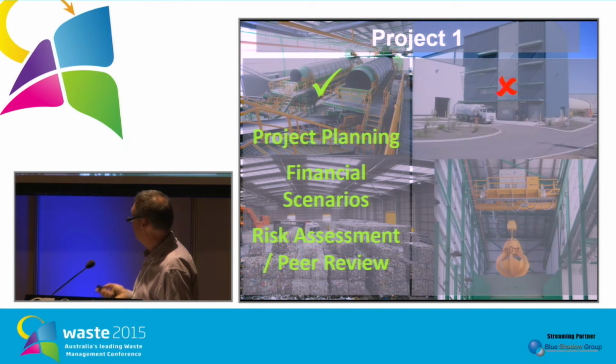And then the last thing they did is they had a really good risk assessment peer review process. So what they did is they did all the work and they built in a process for getting an independent third party to have a look at it to see how it stacked up.